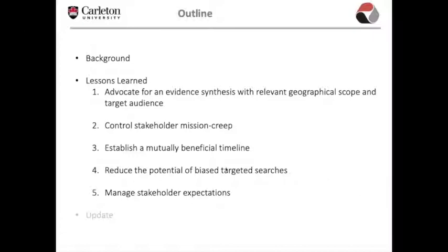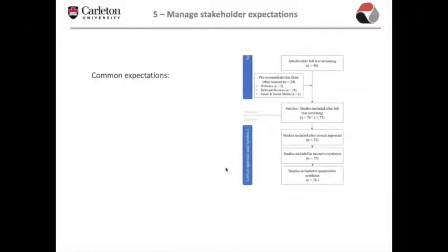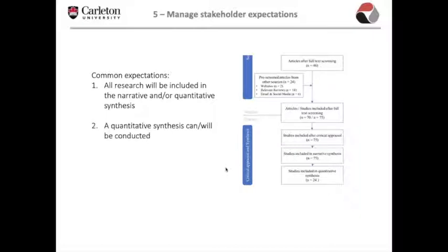And now on to the final lesson of our paper, managing stakeholder expectations. So two common expectations we have encountered when introducing stakeholders to evidence synthesis are that, one, all research will be included in the narrative and/or quantitative synthesis, and two, a quantitative synthesis will be conducted. We have learned that frequent communication between project leaders and those commissioning the systematic review is essential at all stages of the review process to set and manage expectations for the final review product.